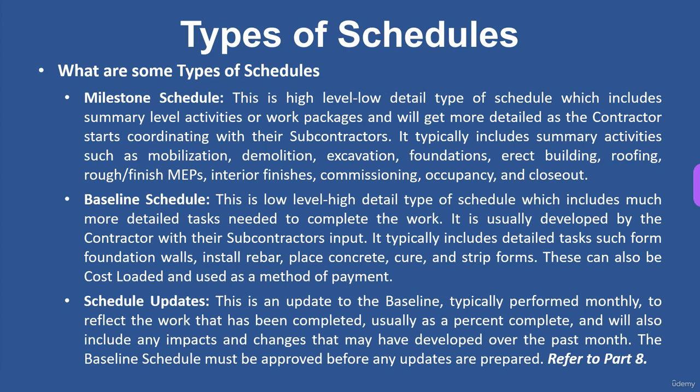So it's kind of a quick schedule. Often you see this during pre-construction while the contractor is putting together their baseline schedule. It just gives everybody an idea of roughly how long the project is going to take, and these things are all done in phases. It's kind of a milestone. It simply shows where each one should start and finish, and the total duration of that group of activities.